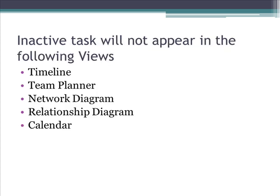For the following views like the timeline view, the team planner view, network diagram, relationship diagram, and the calendar view, inactive tasks will not appear. Inactive tasks are more for the Gantt chart kind of views.